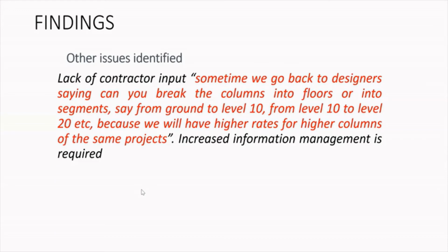They will ask if it can be broken into each floor so that they can use that to their benefit when they do the costing. The costing of the first 10 columns on the ground floor would be different from the costing of the columns in the next 10 floors.